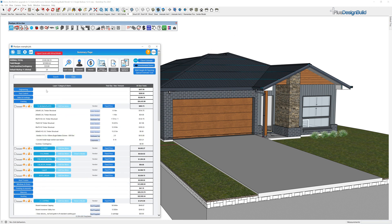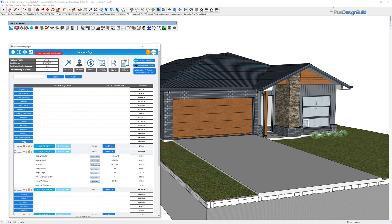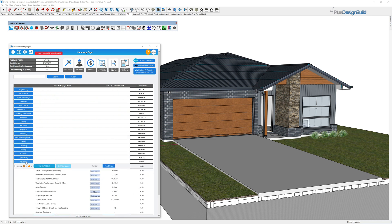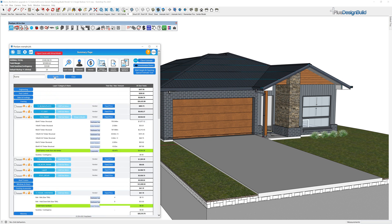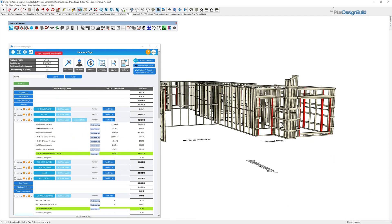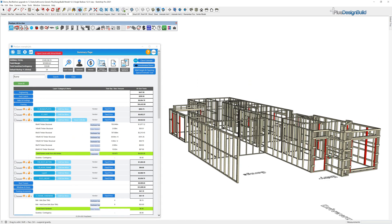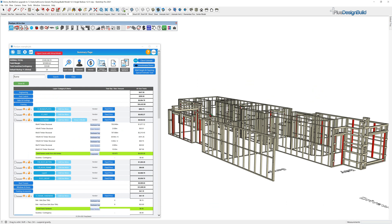We can also go through and close these things down because it's very easy to find information when we're looking at it in this particular view. But we might want to know how much the frame is going to cost to install. So we go through and search and we can see we've got build sick timber. If I go show in model, what is it we're talking about for this price? At the moment we're looking at four thousand dollars to build all of these frames on site.